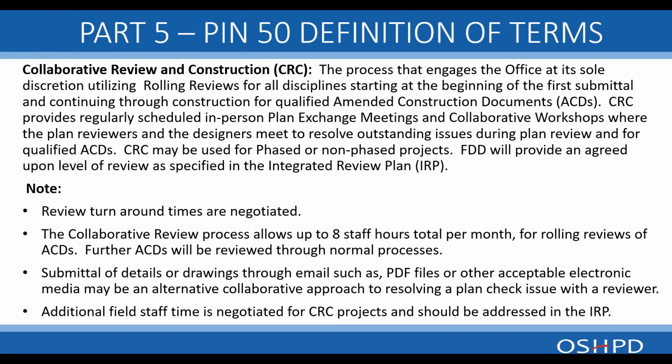CRC provides regularly scheduled in-person plan exchange meetings and collaborative workshops where the plan reviewers and the designers meet to resolve outstanding issues during plan review and for qualified ACDs. CRC may be used for phased or non-phased projects. FDD will provide an agreed upon level of review as specified in the integrated review plan.